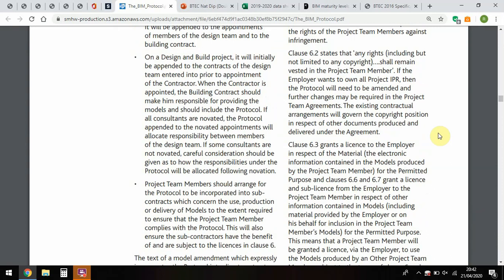It is their project. You can't just walk away with it just because you've got a copy of all the documents. The client can't suddenly go, thanks architect, I really like what you've done, but I'm now going to take it to another architect. I'm going to take your design, I'm going to take all of your intellectual property because I've got access to it as well, and I'm going to get someone else to do it all. I'm going to get someone else to go and pretend that it's theirs. They can't do that. One of the risks if you are sharing your own work this much is that that could happen. The BIM protocol protects those people and protects their work.